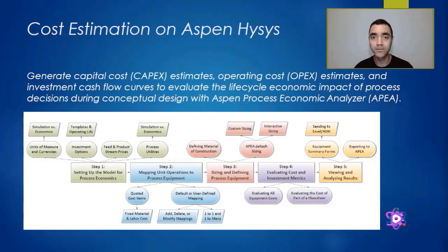550,000 US dollars. So there is a big difference between the results from the process simulation and the results of real life. But in that case, the compressor is a reciprocating compressor. So when you change the technology of the equipment, the price of the equipment will also change.